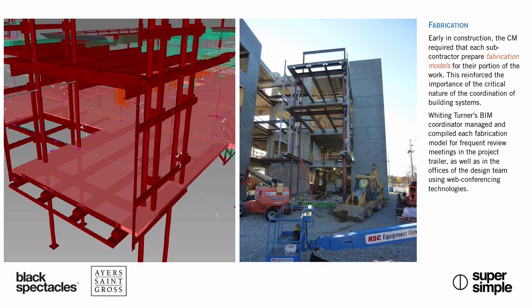That's interesting. Okay, so in many ways, that's kind of where the rubber meets the road. That's how you get something that you're able to talk about like this. In your case, you had a construction manager who's sort of quarterbacking the whole thing, and so it's their contracts that they're sending out and the requirements they're putting in those agreements that is resulting in subcontractors who can produce digital models like this. Correct, yes. Okay. It's sort of a forced marriage of technologies to ensure an outcome, essentially. Mm-hmm. Yeah. Okay.